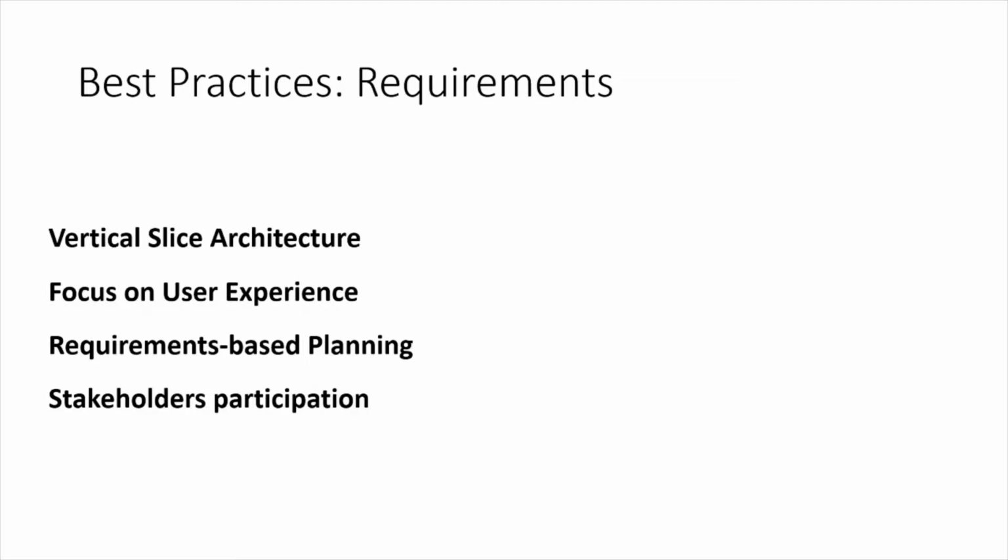So what does this mean? It means that you have a technical architecture focus first. So you work on the database definitions, on the normalization, on the ETL scripts, whatever it is, and no functionality is being developed and deployed to the production environment. So the customers, in fact, don't have anything to work with, right?